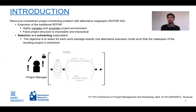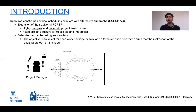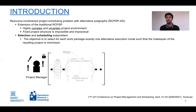Therefore, we have proposed an extension called the Resource Constrained Project Scheduling Problem with Alternative Subgraphs (RCPSP-AS). In this problem, we identify work packages — sub-projects within the project — and alternative ways to execute each work package. As a result, there is now a combination of a selection and a scheduling subproblem.